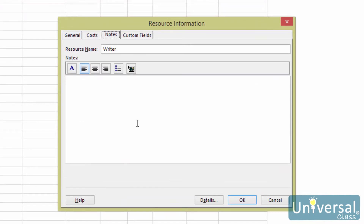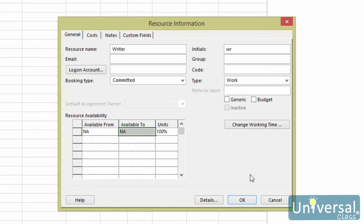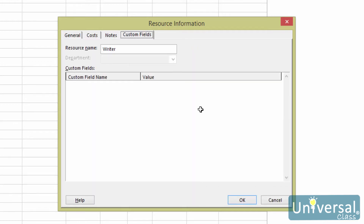In the notes field, you can write down notes about the resources, such as skill and availability. In the general tab, the code field in the resource information dialog box allows you to rank resources by cost, skill, or the ability to work with others. The custom fields tab allows you to note specific skills and search for those resources by those skills.